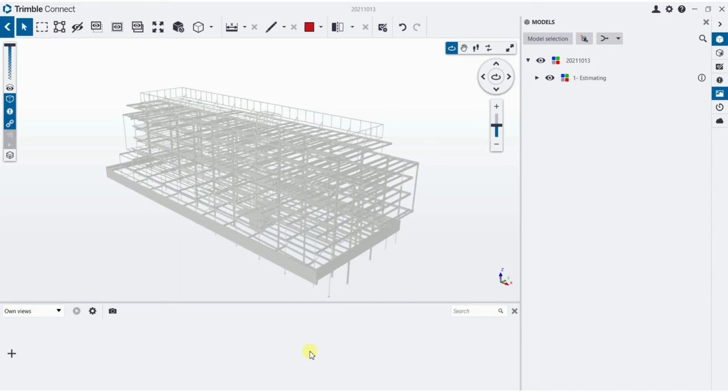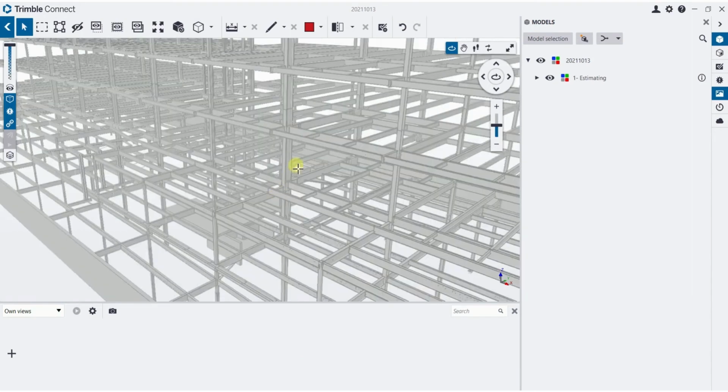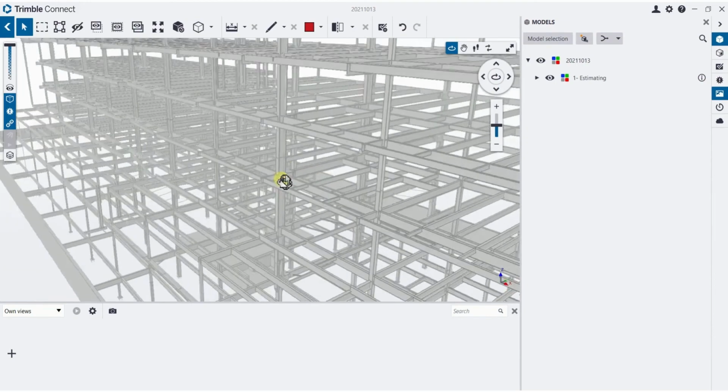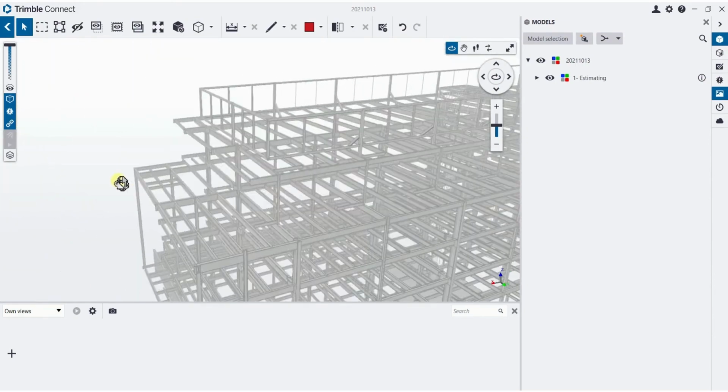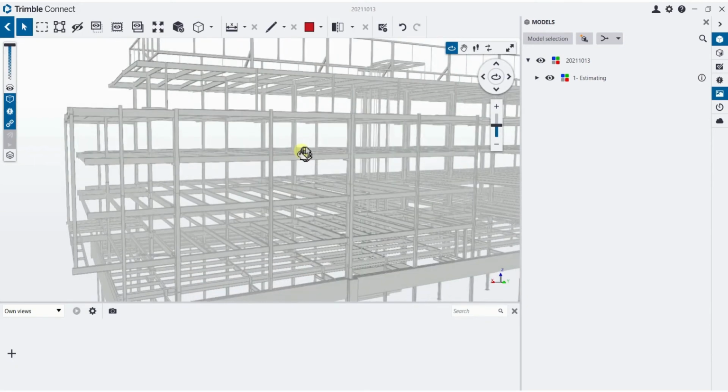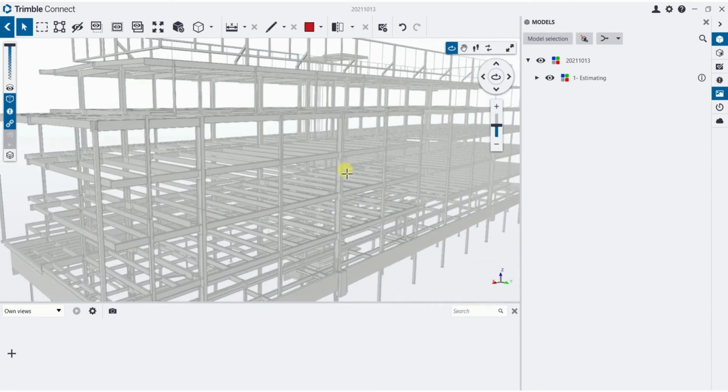Thank you, Henry. Before I begin, I want to point out that having Qnect take a model and actually connect it is a huge advantage when you're doing the Estimodeling and bringing it into EPM. For one thing, you could bring it in, rerun the connections for value engineering, bring it in again and see differences very quickly in your estimates. That's a distinct advantage there.